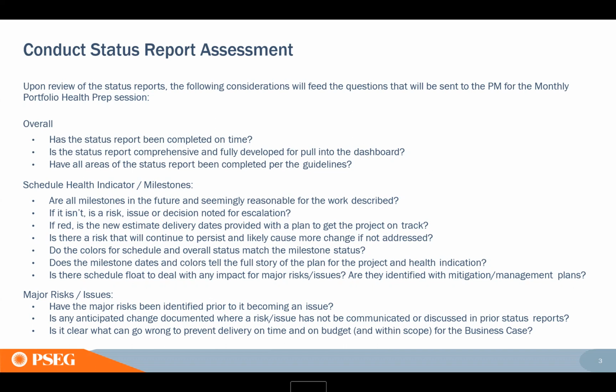If it's already passed and you haven't explained that you're going to be updating it, review your timeline and provide insight. If it says 11:30 you are going to complete a milestone and you never completed it, give a reasonable explanation as to why. Don't just leave a date in the past out there. Either move it out or explain what's happening and when you're going to move it out.